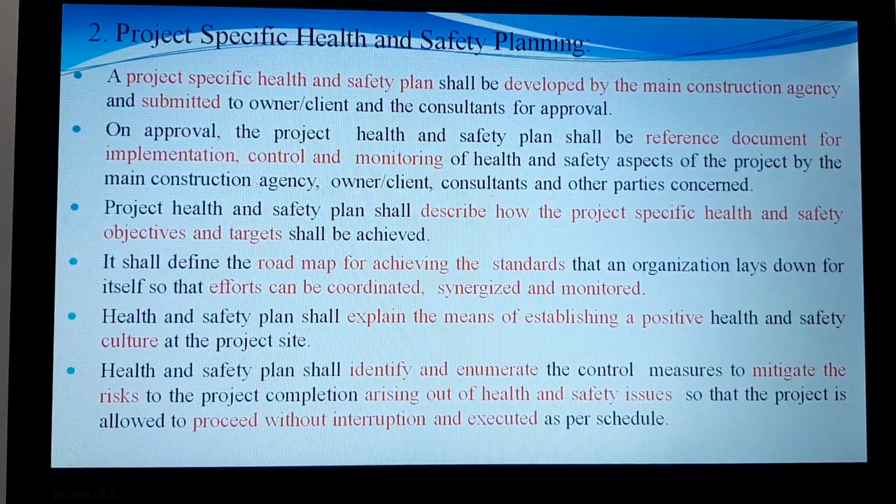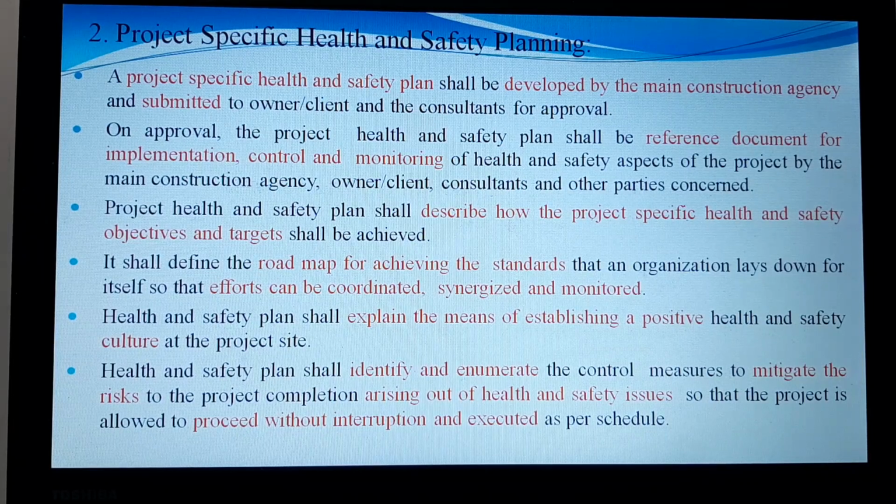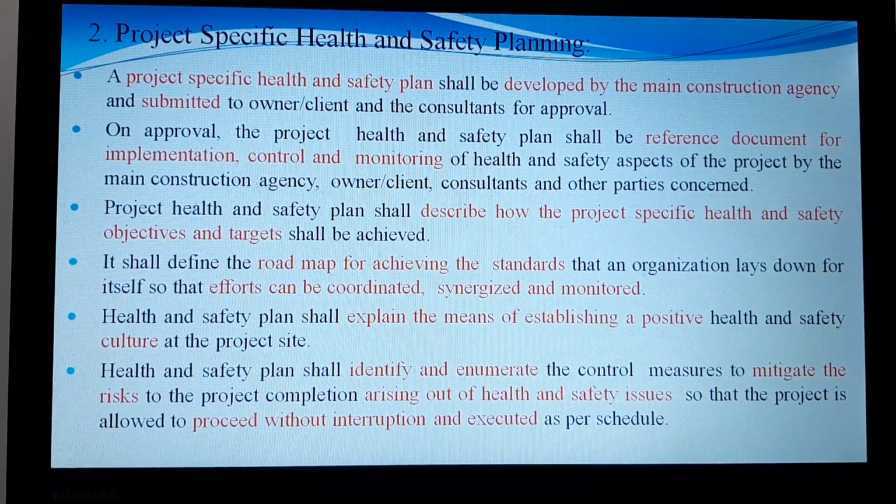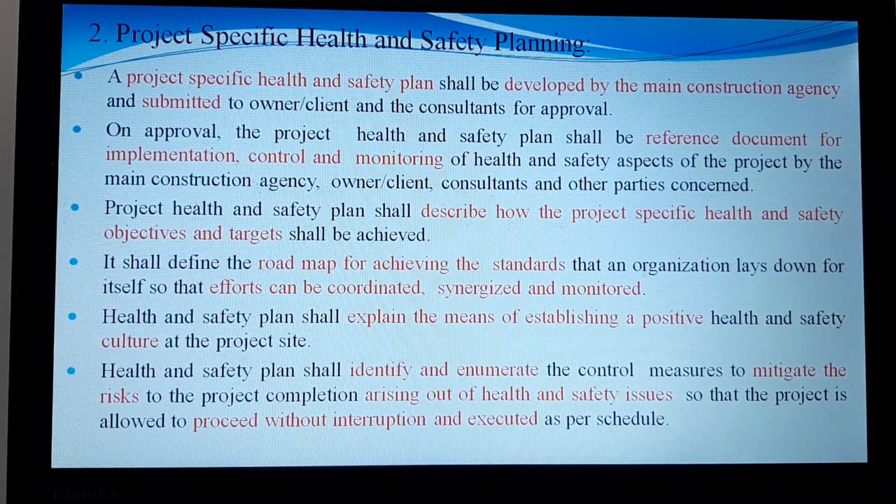The second important point is that the first one was very general. Now, towards a project, which may have its own uniqueness, we should have something known as project specific health and safety planning, and it has to be done by looking at or reviewing the work. The main construction agency has to do it, and it should be submitted to the owner and client, and on approval that reference document should proceed towards implementation